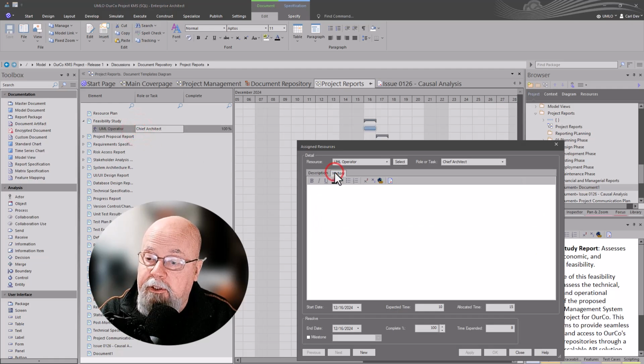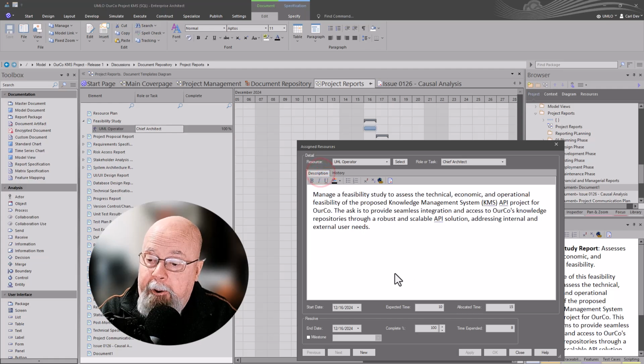Like for instance, in Sparx, you have a history. They can go through, start, and plan amount of effort going into it, actual amount of effort. And then hopefully if they deviate from the actual, that you're capturing why. What was the reason for it? And then you're using that intelligence for your closure report, your lessons learned, your causal analysis, post-mortem, whatever cool names that you want to use on it.